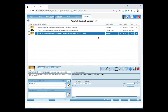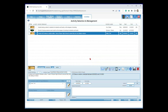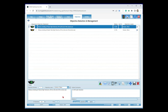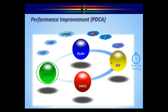Back to the check phase. I'm going to look at my objective level since it's a finite target. My objective is to reduce smoking at Wayne High School by 25% by the end of the school year. Looking down here, we have our percent reduction currently at 25%. We have a plan of 25, an actual of 25 — looks like everything's working really well. So that's the check phase — if you're collecting all the information in the background, you can look at that and say we're there. Now, the adjust phase: we're going to make corrections if necessary. Based on what we just saw, no corrections are necessary — the plan works. Continue to execute and go back in to check it periodically.